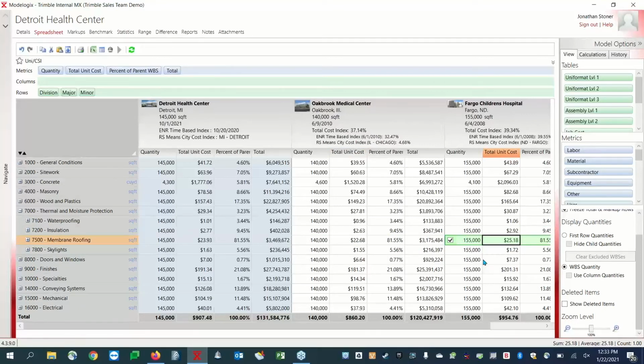So, you know, I could go back and look at that and say, you know what, we had a delay. We had a major weather delay. Part of that job happened in the wintertime, and that's right when the roof was going in. We had a major delay on that and increased our price. We had change orders. We had extra heating required or whatever, you know. So it inflated our price, but our original bid price was $23. I could change that right there.